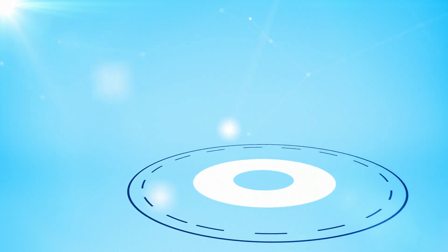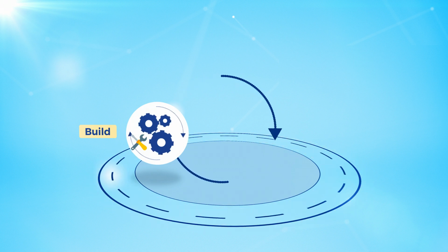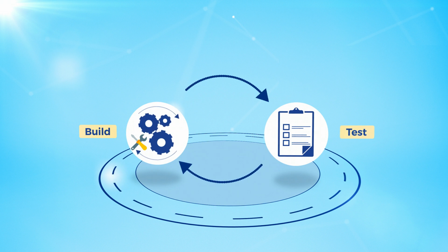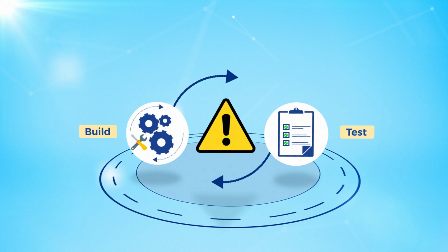Another characteristic of Agile project management is that you identify issues much earlier. Because testing is ongoing with each iteration, rather than just in one testing phase at the end of the project lifecycle, issues are realized much earlier in the development process.